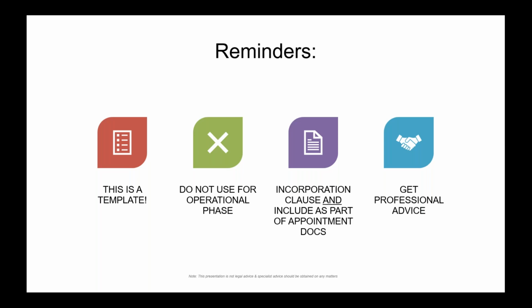It's not enough to refer to it as one of the list of the standards, which I've seen several times over the last year, where say a client lists, these are the standards we want you to comply with, and they list all the ISOs, and then they list the information protocol as well. It's a contractual document. It won't have any effect doing it that way.